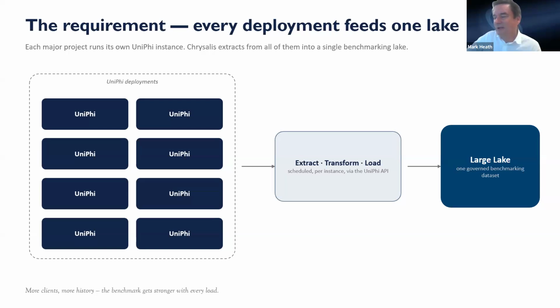The 2 Uniclass structures we're looking at are the way that people are defined in engineering, so Uniclass engineering classifications for people, and the way that activities are defined in the Uniclass structure for engineering. So, in the UniPhi instance itself, activities will be called whatever people need them to be called to track that work package, and that person will be classified that way, and they need to report rates and communication back to the client. So we need to be able to infer what that means in the Uniclass standard and tag that person and tag that activity with that Uniclass standard.